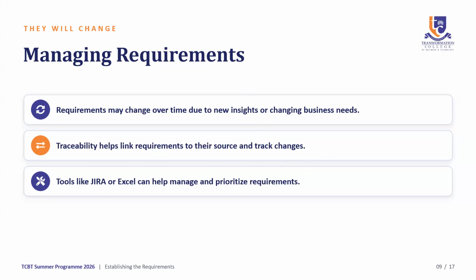Very important when it comes to change management, right? There's a sign off, because at the end of the day, if a change is implemented, you want to know who gave the permission for that change, because we agreed earlier on that it should be XYZ. So why am I saying ABC? Who gave the permission for that change? And so in change management, there should always be a sign off by a senior stakeholder involved in the process, right? There should always be a sign off by a senior stakeholder involved in the process.